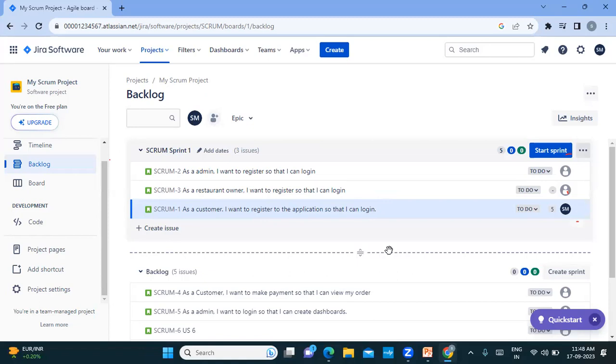What if the user story is too big to complete in a single sprint? Will it be broken further into smaller user stories? If you have a big user story, we call it an epic. You don't have smaller user stories under a user story, they're called tasks. If you have that scenario, call it an epic, and then you can have user stories under that.